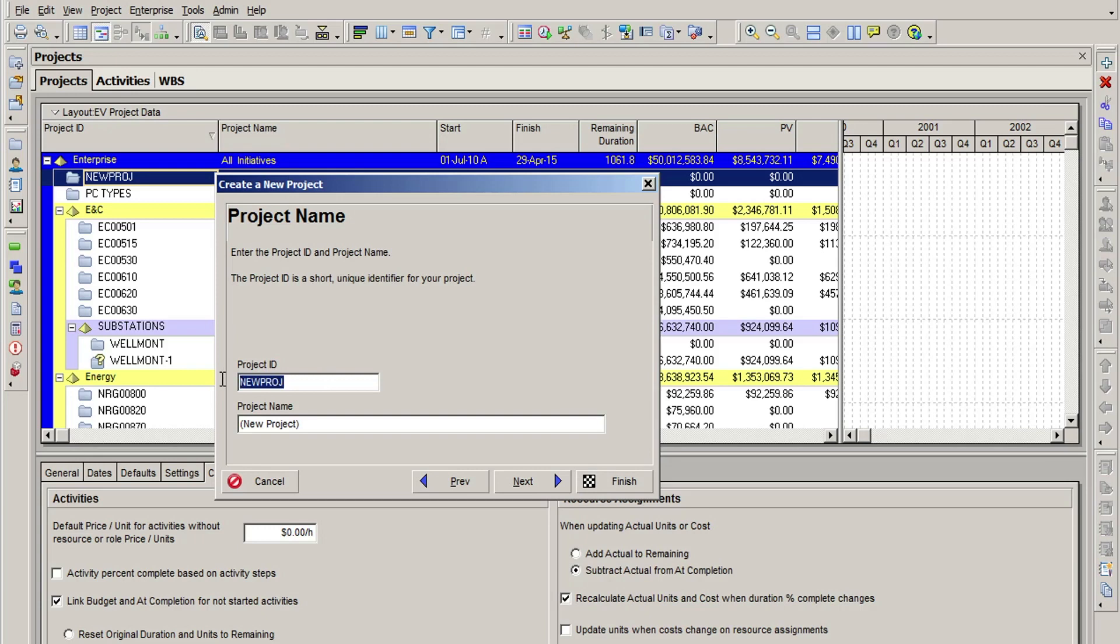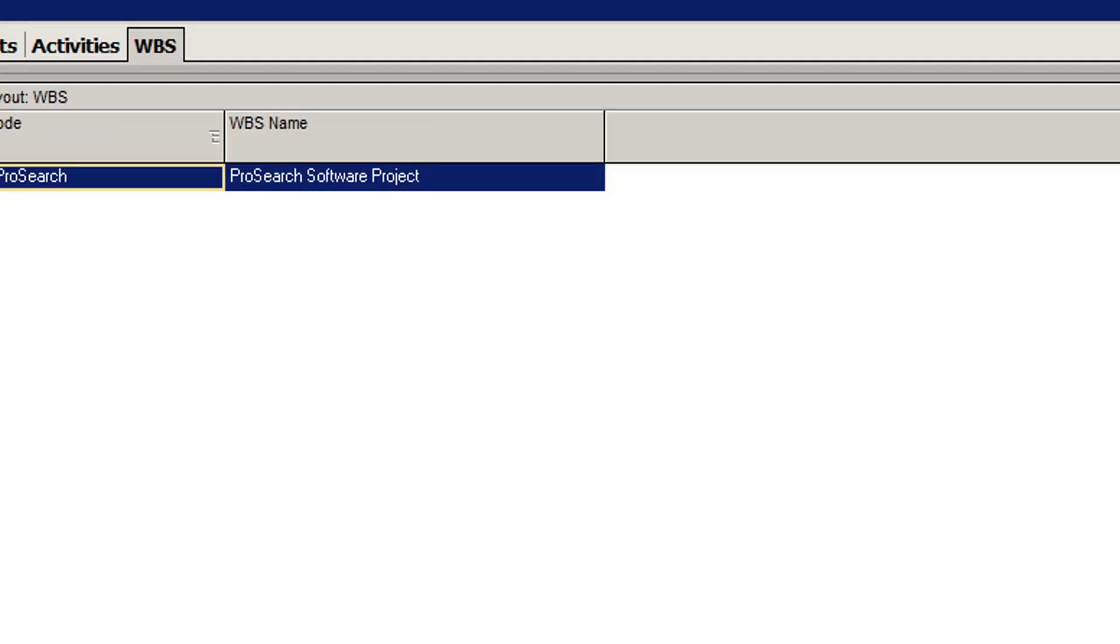First, you start with the project itself. In this example, the project is called ProSearch. So ProSearch is the top level of the WBS.